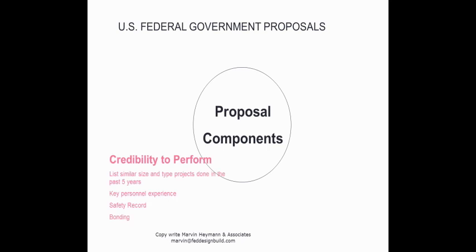First, your credibility to perform. It's not just enough to say that you're a great company. You're going to have to demonstrate that you have done a similar size and type project in the past 5 years of that in the solicitation. And they can be design-build projects, or it can be construction-only projects, or whatever.